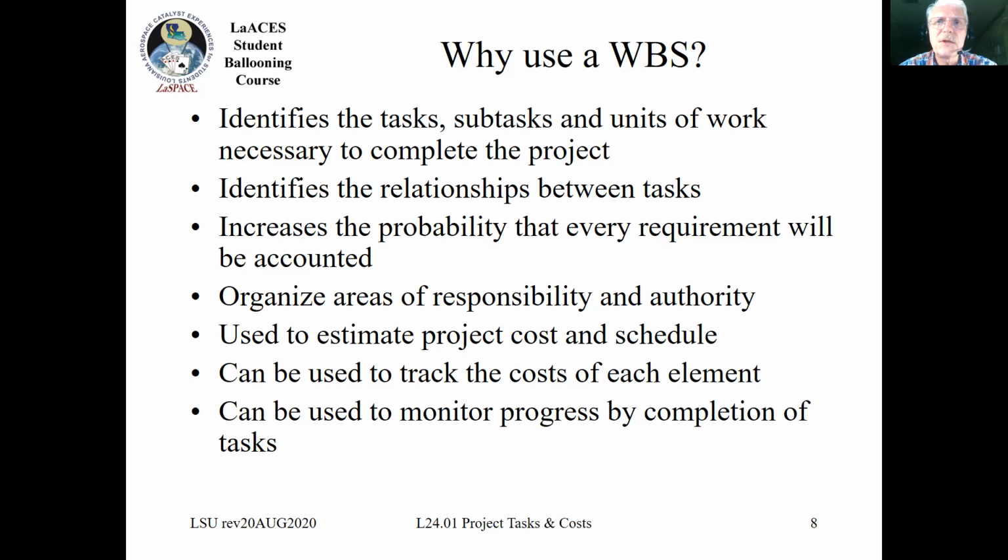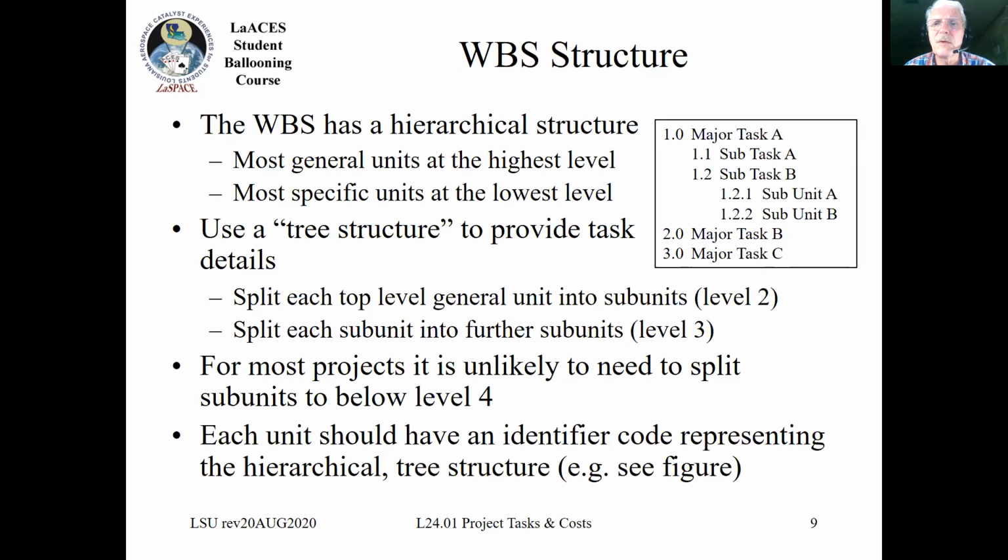It also helps you determine the relationship between tasks, and helps you organize responsibility and authority. You can use it to estimate your cost and schedule, and you can track and monitor progress throughout your project by determining how many of these WBS elements have been completed and whether you are on time for completing up to that level. So there are a number of reasons why you would want to use this.